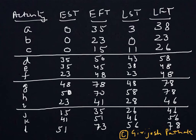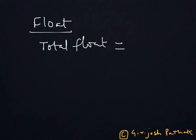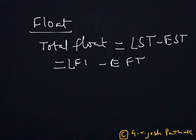This is called float or total float. Total float for an activity can be computed either by taking LST (latest start time) minus EST (earliest start time), or by subtracting earliest finish time from latest finish time. This gives us the extra time available for that activity.